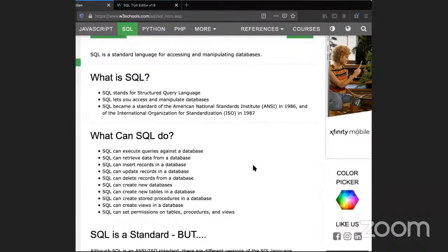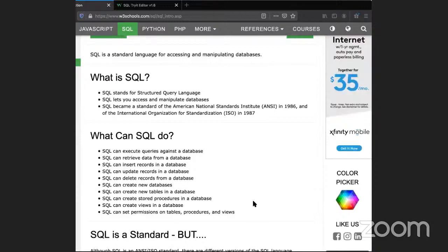And then you come to the acceptance criteria. This is where the real deal happens. This is where you are able to break down the story and write down the line by line items and a descriptive explanation of exactly what you want to build. This is where you put together the role, the goal, and the benefit. So as a user, I want to do this so that, and this is where you put everything together.